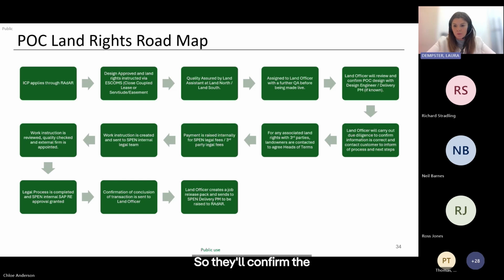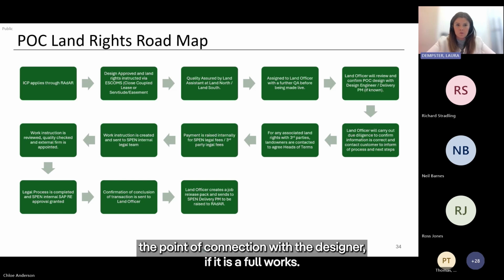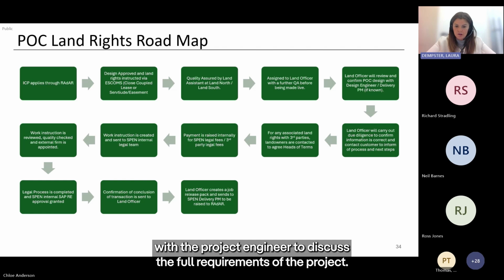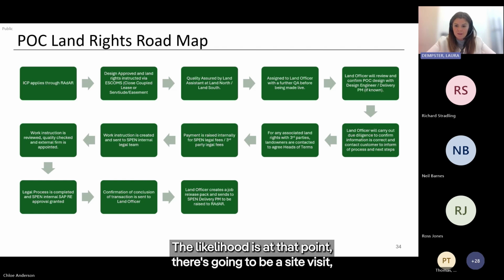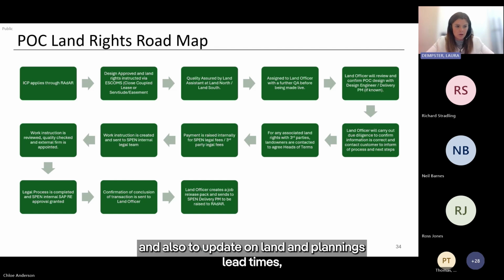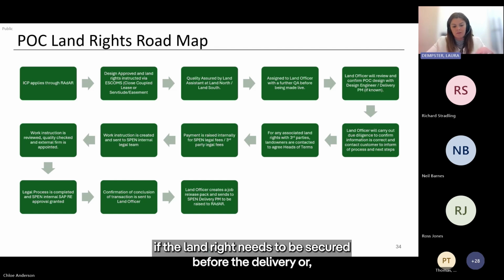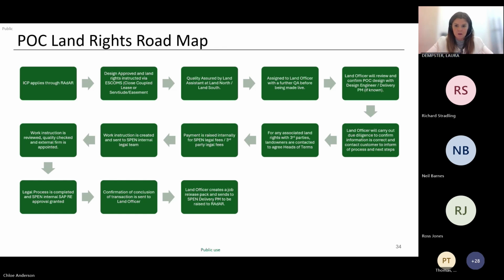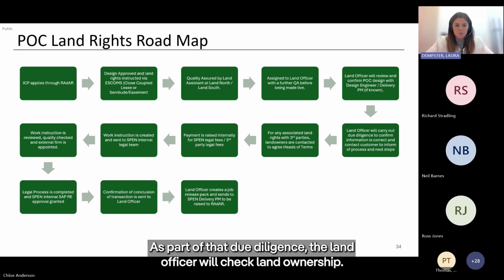So they'll confirm the point of connection with the designer. If it is a full works, they'll discuss it with the project engineer to discuss the full requirements of the project. The likelihood is at that point there's going to be a site visit to meet with the customer to fully run through the project and its requirements, and also to update on land and planning's lead times, because that will have an impact to your program if the land right needs to be secured before it's delivered.